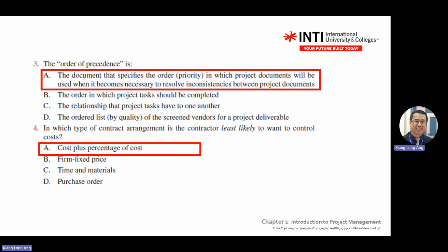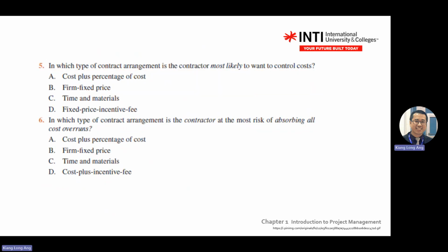So contract management, type of contract, the contractor least likely to want to control cost is the cost plus percentage of cost. That is the least likely one. The fifth one, which type of contract is the contractor most likely to want to control cost? Just now was the least one to control cost. This one is